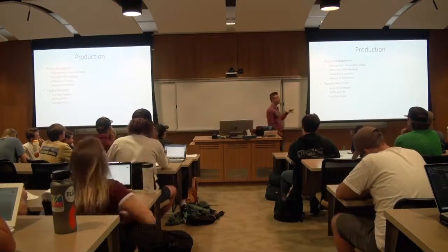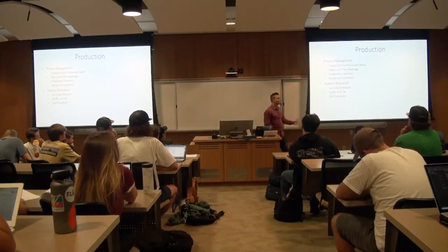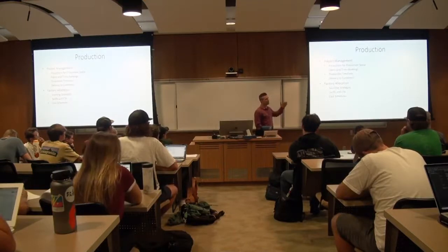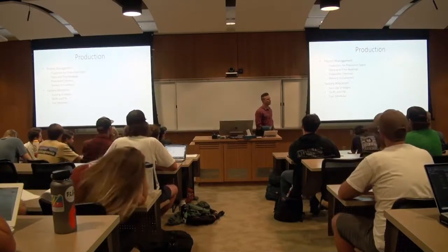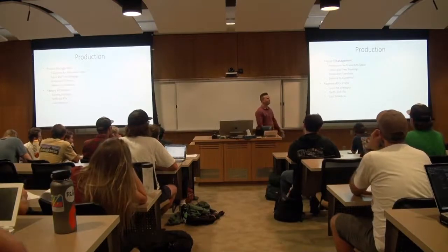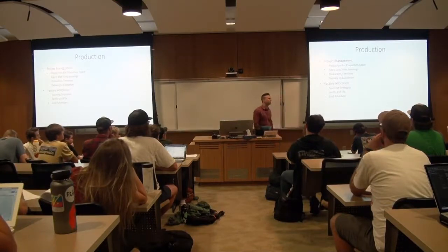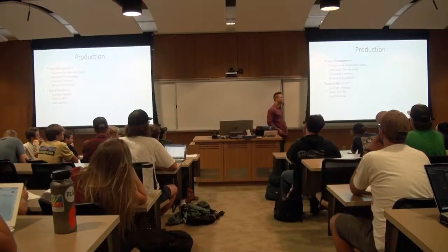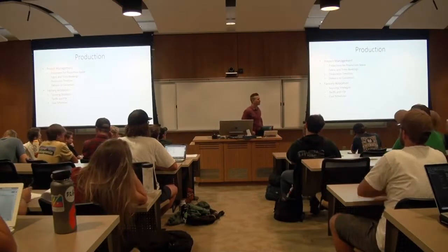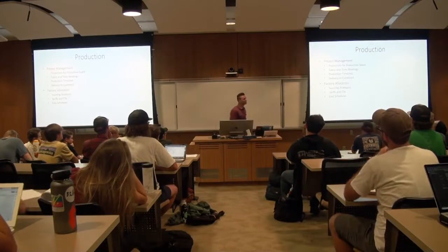A lot of these smaller Southeast Asia countries are becoming saturated as people are leaving China. So their MOQs are going up, their costs are going up. And if you don't have a foothold in a lot of the factories, you can't find space, or you can't find the space that you want. They may say, hey, we can sew that for you, but it's going to be 6 weeks off your schedule, which for us is half of the season, so it doesn't work. It's the topic du jour around our office, and I promise you anybody else from the industry who comes to talk to you guys is going to share the exact same thing.